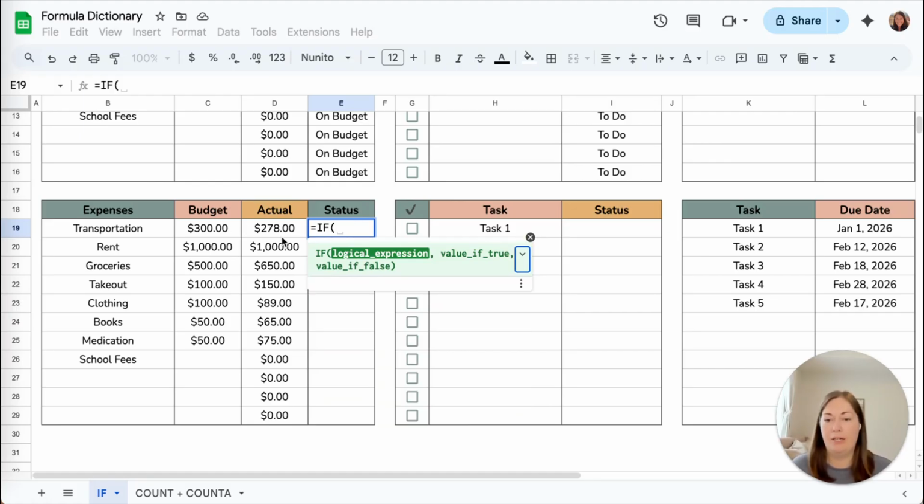Basically, what I want to do is calculate whether my actual has exceeded my budget. For this one, we're going to do a little bit of a math equation, but like I said, there are many different ways to do this, so don't get overwhelmed. I have to do an equation where I take my budget amount and minus the actual from it. I want anything above -1, so even if it's 0, we're on budget. If it says 0 or anything above it, we're on budget because we still have money left to spend, whereas anything in the negatives means we overspent.